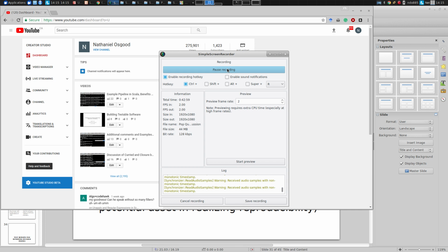People say before you commit, you need to have someone else on the team at least look this over and give a thumbs up that it looks basically good. So that can find issues earlier than if it had just been committed. People push it, and people do pulls from it, and they find that it doesn't work with their system or whatever, and it spreads that knowledge around. So I like that. Other things?